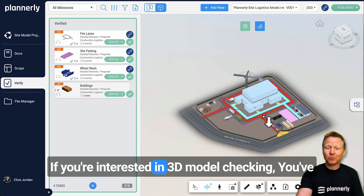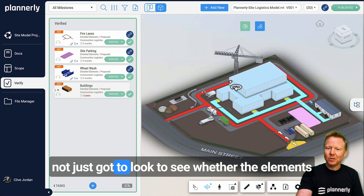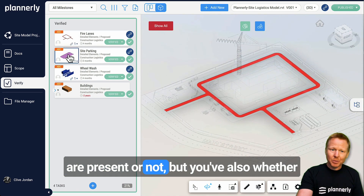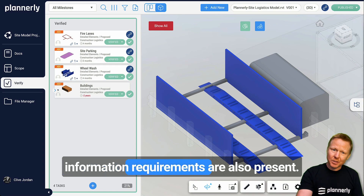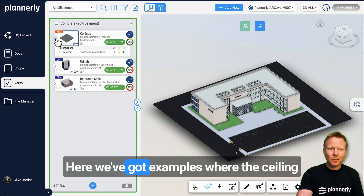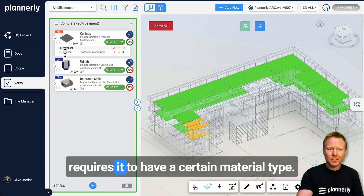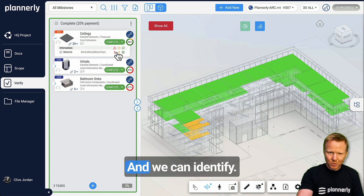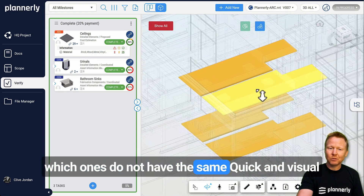If you're interested in 3D model checking, you've not just got to look to see whether the elements are present or not, but you've also got to see whether the information requirements are also present. Here we've got examples where the ceiling requires it to have a certain material type, and we can identify which ones do not have the rule.